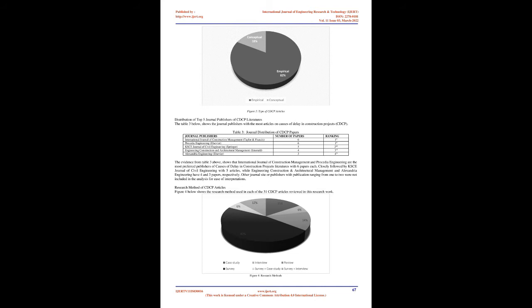IJERT Mensah and Knight, 2017. Exploring the practitioner's perspective on 32 delay causes in the UK construction industry in the post-recession era. Inadequate project planning, poor commercial decisions, design problems, scope creep, and unclear project requirements, financial problems, inexperience and incompetence, inappropriate risks transfer and mitigation, poor resource management.